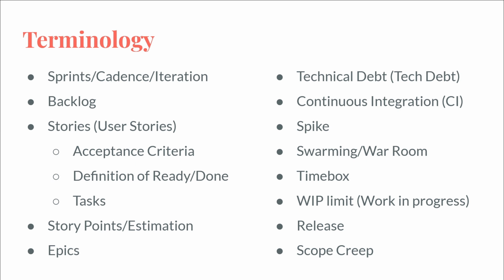I don't really want to make a ticket just for that and make a pull request just to do that. So I'm just going to go and throw that in with the ticket I'm already working on. And while I'm at it, I can actually clean this part up too, because that's related, and that's scope creep. I started off with something that should have been a 100-line change in 2 files, and I ended up with a 3,000-line change across 30 files. And it's just a lot of really tiny things that didn't really matter. That's just lots of little tiny polish and cleanup and detail work that's good, that should be done, but